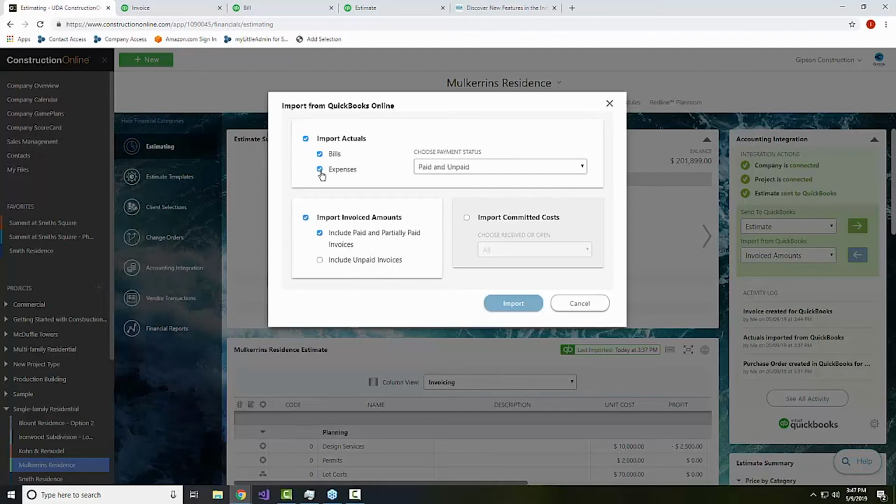Now, I say that it's specific to the style because I'm fairly certain that's how T-Sheets works and some of the major time tracking tools work. Others will put it into a kind of a holding area where it may be treated more like a committed cost instead. And so if that's the case, then when you're taking a look at your committed costs, maybe at that point we would be pulling in only received, partially received, or open and partials. One of these options instead to track what's out there that we still have to spend money on.